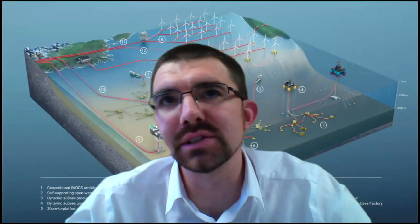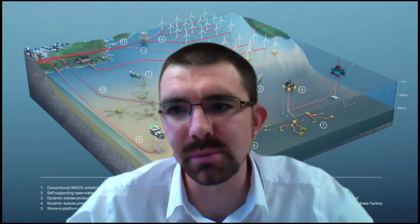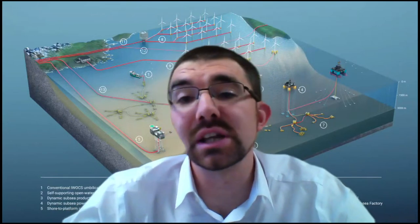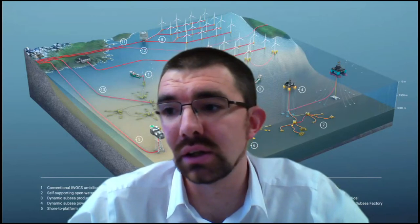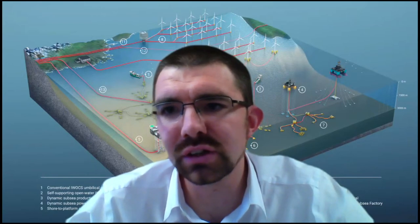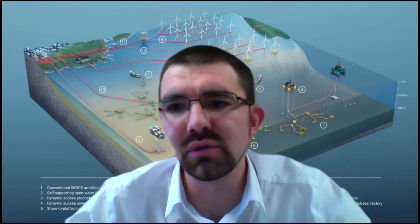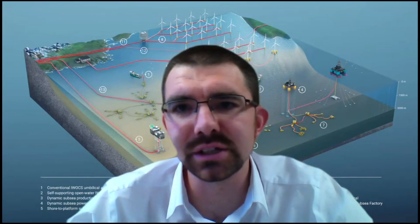What you need to remember is that the access to the area with the permits and things, we have to do the first test, wait for the all clear to be given, de-energize the cable, and then we need to go in, we need to change around some of the connectors. That takes some time to disconnect the fissures and move them around. And then potentially we have some switching operations to do as well on a turbine in order to then start the test. So typically on a good day, you can do them in, I would say, a shift. I'd say a 12-hour shift is really the best practice for doing it.